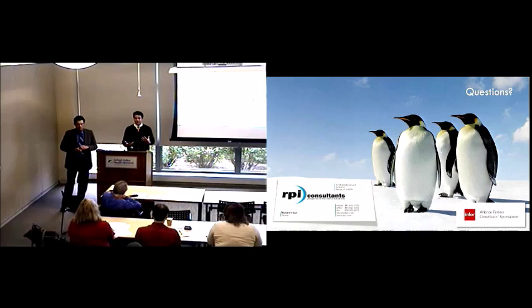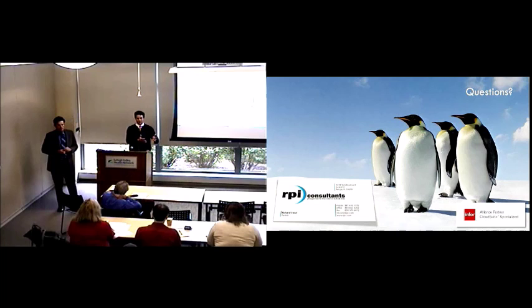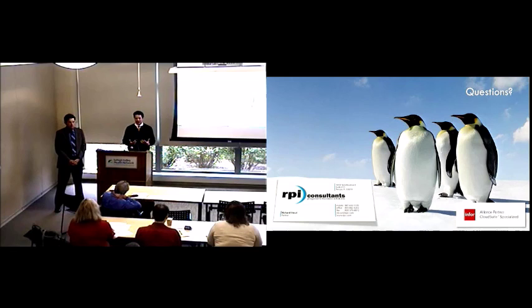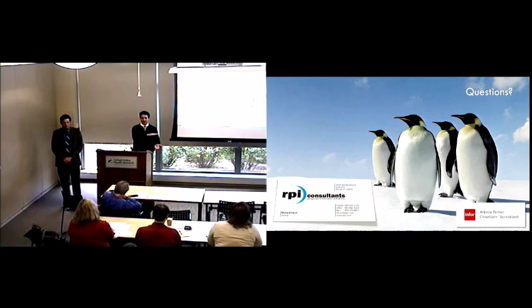So what we do instead is we identify for each functional team a leadership role that is ultimately accountable for that functional area. They typically divide along financials, accounts payable, payroll, HR, the normal supply chain, the normal application areas. Again, end user engagement early in the process is very important in a lot of respects, but primarily that user acceptance testing sign-off needs to be based on something, and that's what the test plan gives you. It gives you a listing of several hundred use case scenarios organized by module or by functional area.